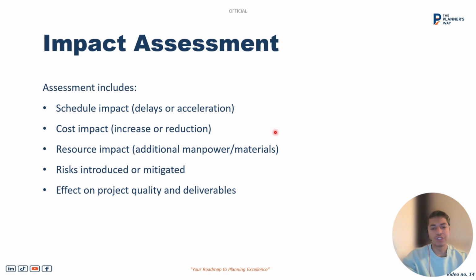For that, we use different software like Primavera or Microsoft Project and introduce that change on the baseline schedule and do a what-if analysis of the scenario and see what the impact on the baseline schedule is when introducing that change, and let the project manager know, okay, this much of the schedule has been impacted due to that change. It makes it easier for them to take the decision whether to undertake that change or not.